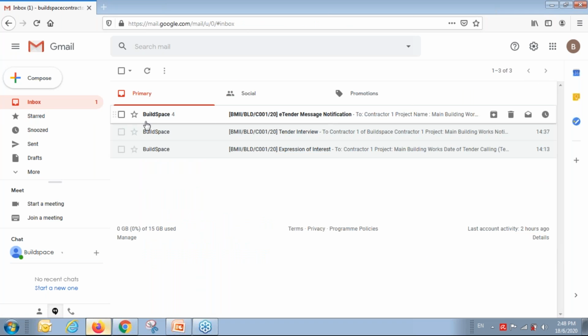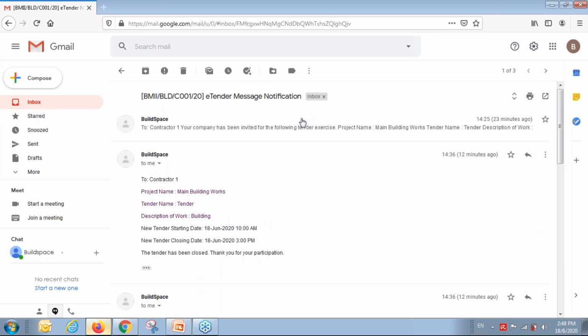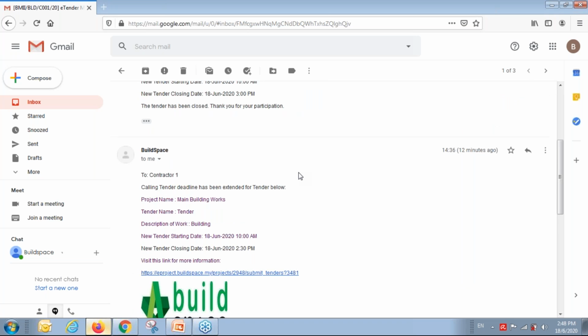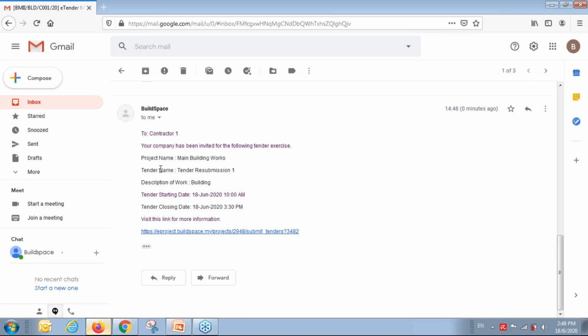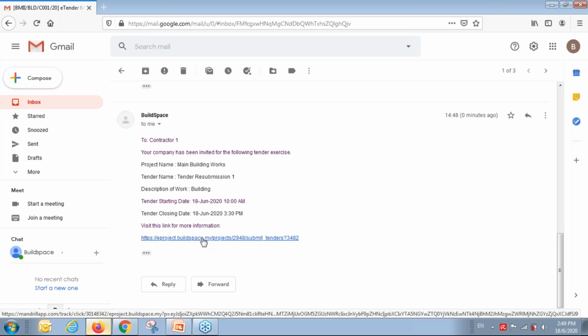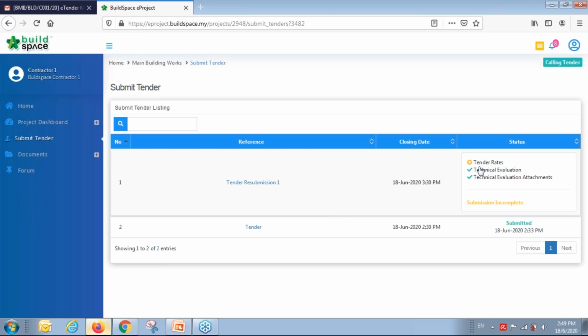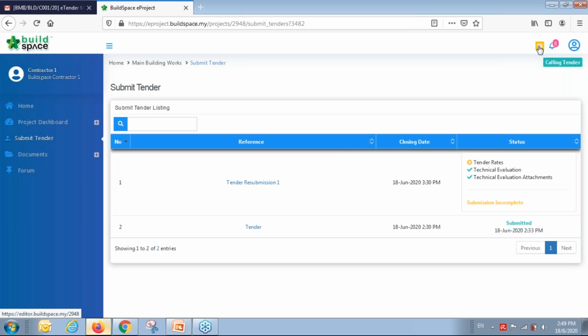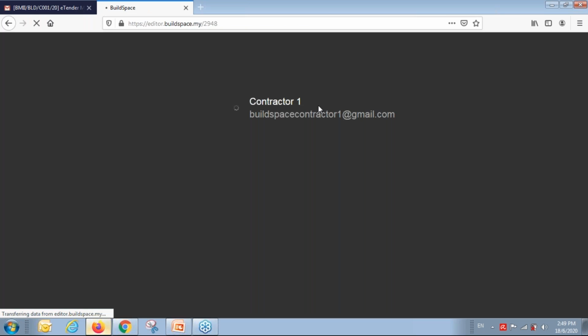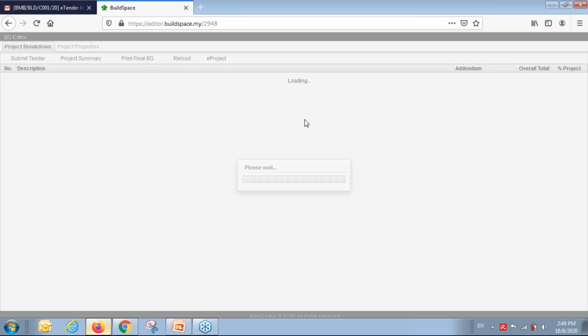Okay, let's say I go back to here, e-tender notification here because I just sent another tender resubmission. Okay, so they can see from here, tender resubmission one. Okay, so same also, contractor, they can click this link to go into the system. Okay, let's say BuildSpace, contractor one. So the contractor, they can resubmit the item. Okay, they need to submit the tender rates. How to submit? They just click on this button, BQ editor. Okay, so they can just submit the rates.